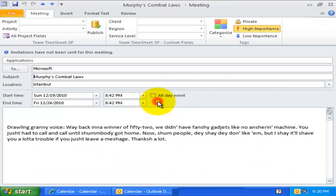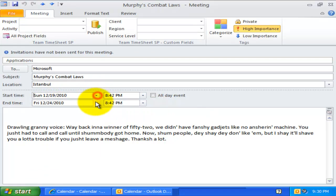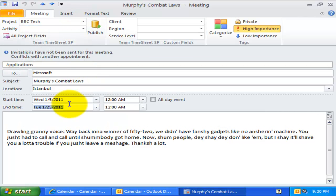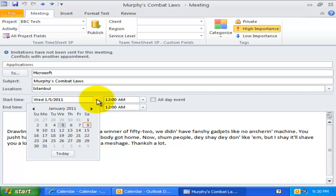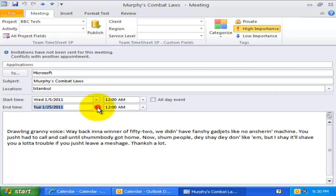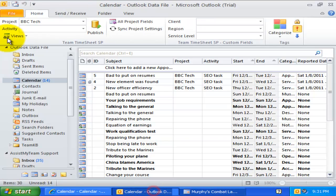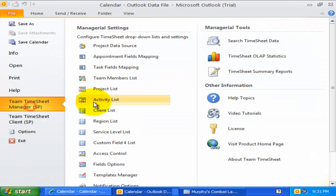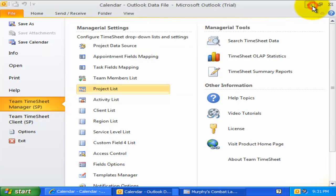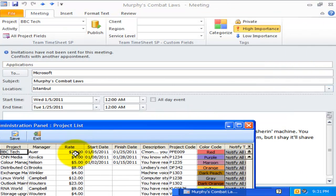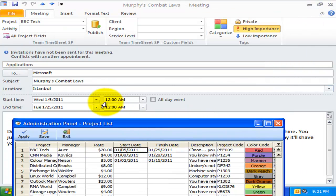For example, here we have this appointment from the 19th to the 24th of December 2010. If I tag BBC Tech as the project, notice that the start time has changed to the 5th of January 2011 and end time has changed to the 25th of January 2011. Let us verify this is indeed the start date of the project in the projects list. And yes, it is.